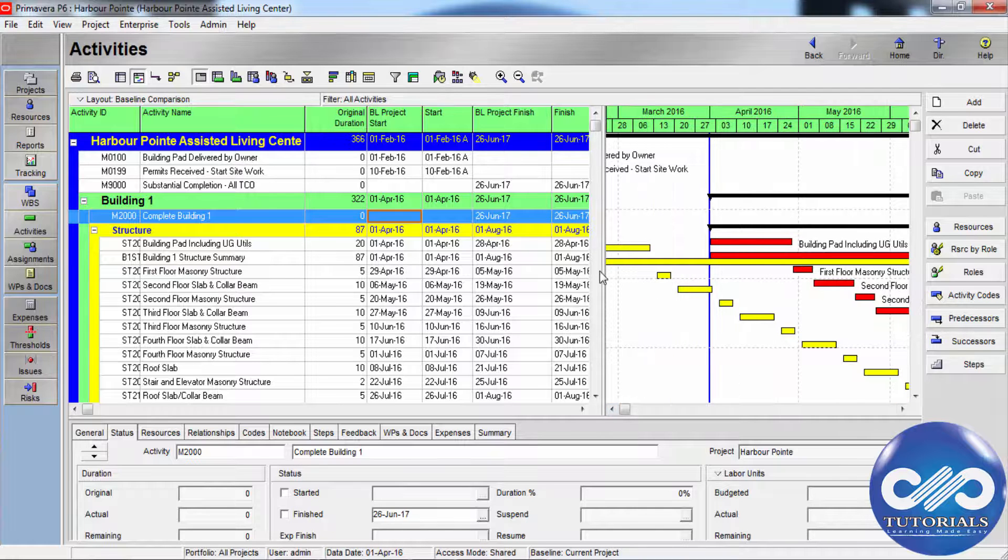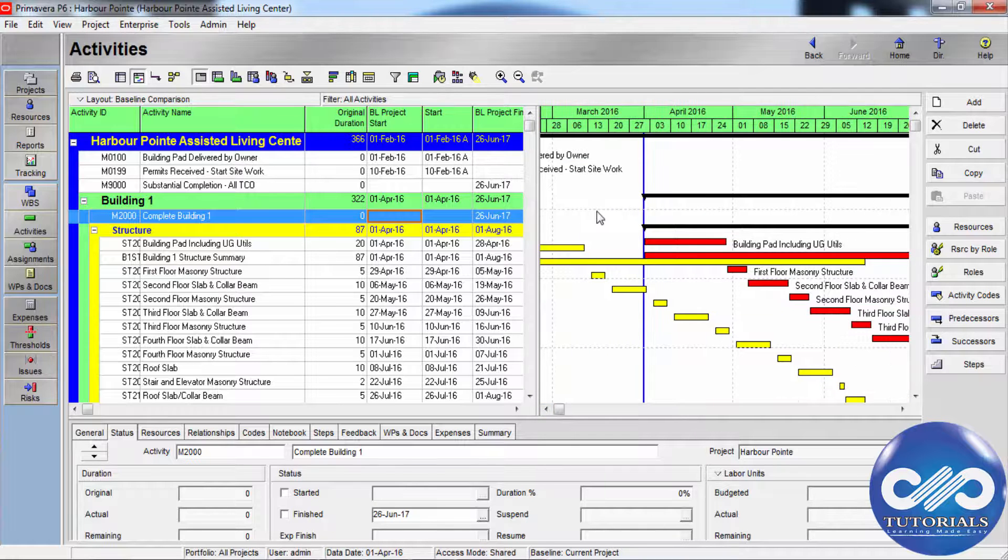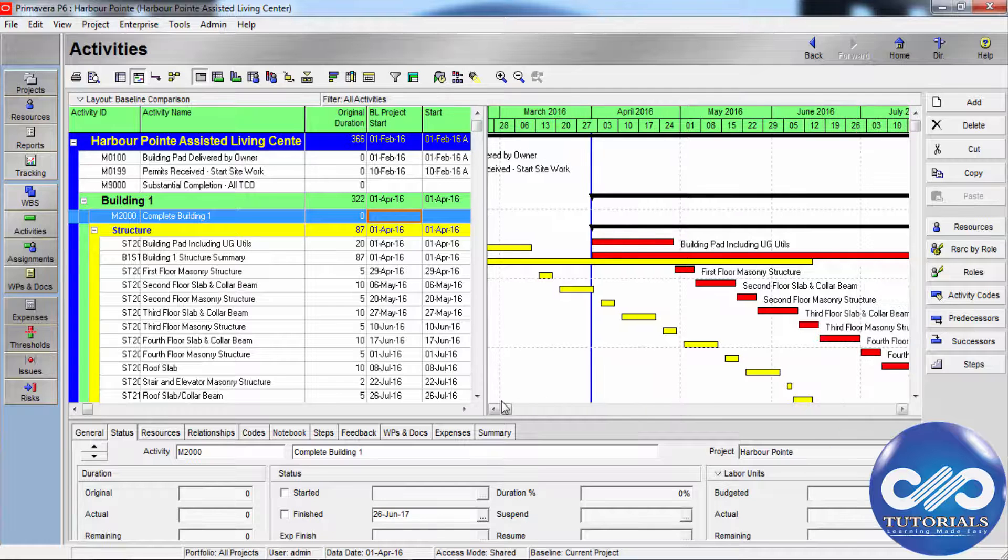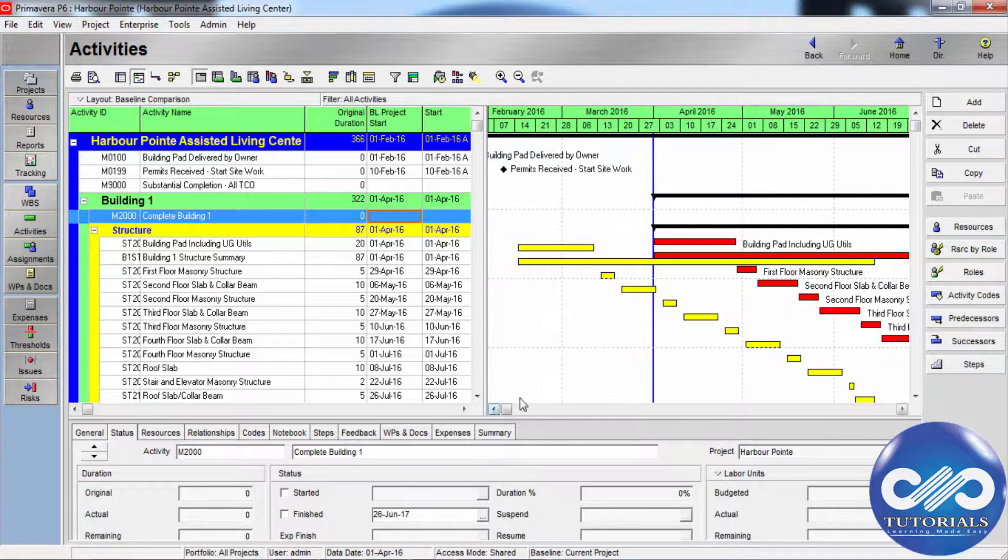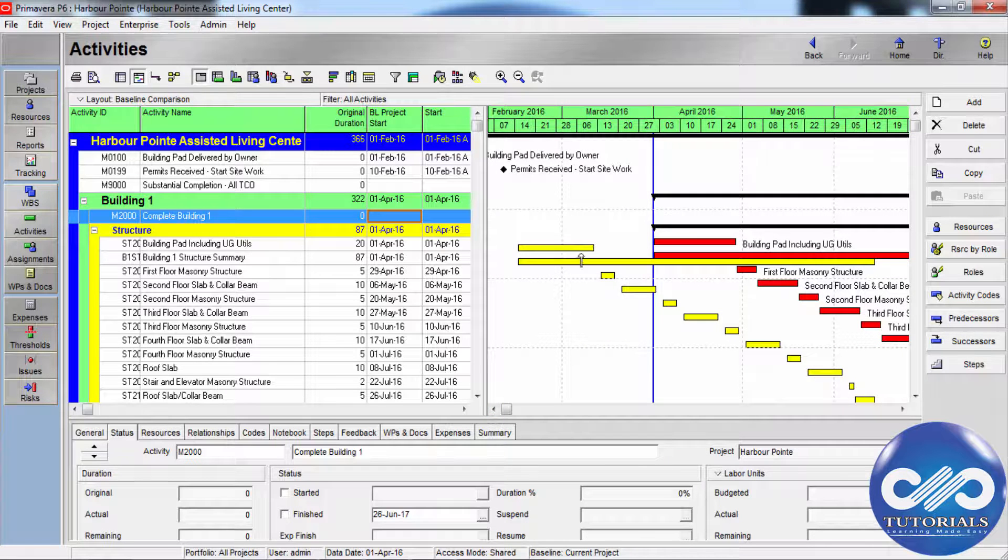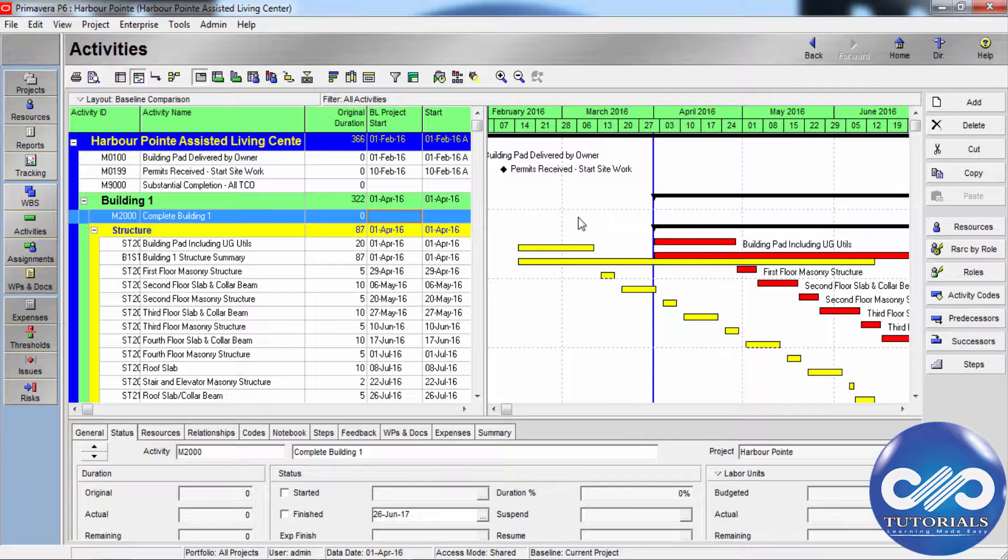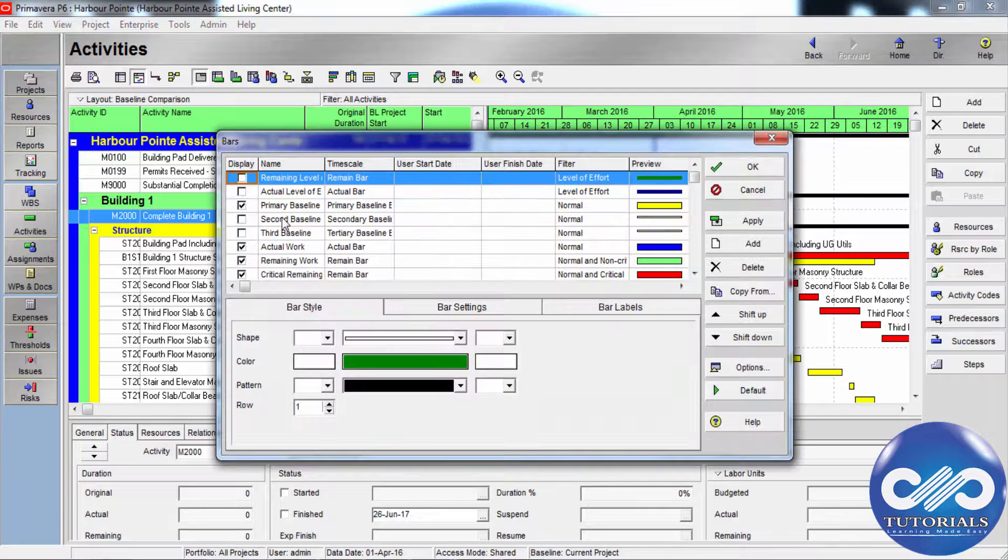Displaying baseline or current bars in the Gantt chart indicates how the schedule is progressing according to the original plan. Here you can see the yellow colored bars which depict the original baseline, that is primary baseline.